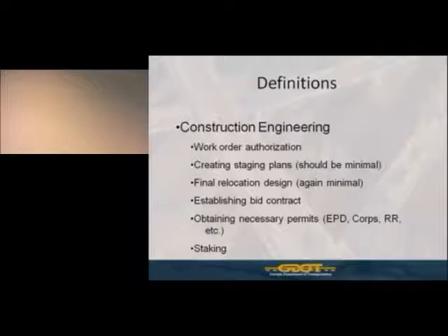Also, obtaining necessary permits. You're responsible as a utility owner for obtaining any permits necessary for the relocation of your work. If the work is not accounted for in the department's roadway plans, that could include the EPD, the Corps of Engineers, railroads, etc. So keep that in mind. You need to account for time in which to obtain any necessary permits for your relocation work,